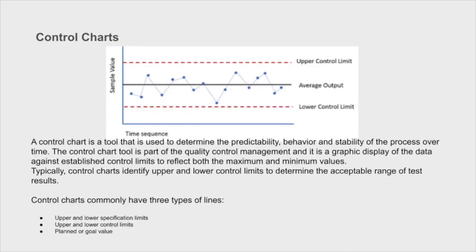Another type of chart that is used in order to really assess quality as we're going along is something called a control chart. And a control chart is really simple. If you look at it, it has a center line. The black line in the middle is the center. That's the average output, so how many units per hour, these sorts of things. And we have what's called an upper control limit and a lower control limit, the red lines. And that effectively means a deviation.